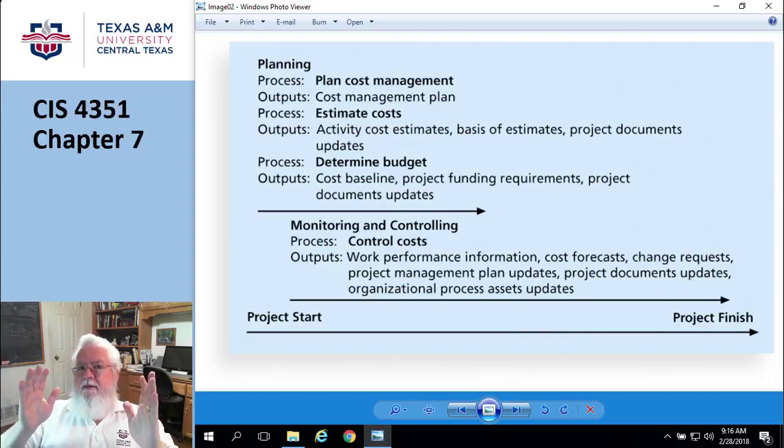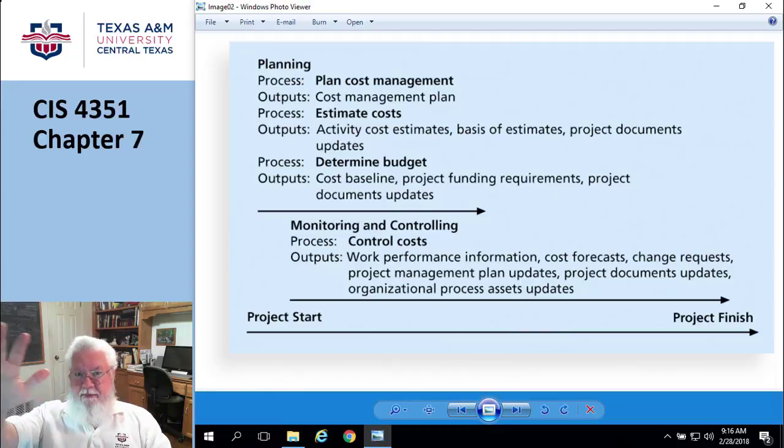Okay, but what's the cost associated with lost productivity? See, that's an intangible cost. It's like, yeah, I don't know. I mean, okay. Typically, you don't budget for intangible costs like that, but you do use that in your calculation for total cost of ownership. Okay.